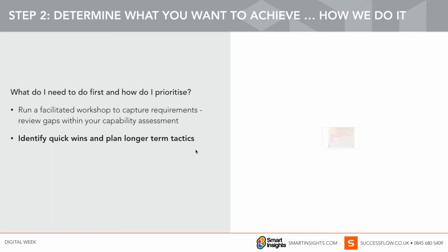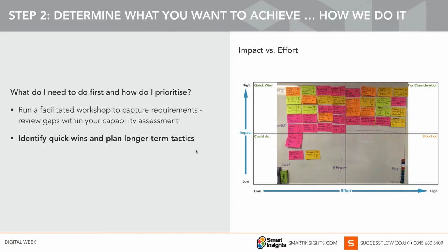One of the things that would come out of the facilitated workshop is this impact versus effort model. We love this. Our clients love this. In terms of high impact down to low impact, and low effort to high, your quick wins live here. We get straight onto these ones and show results and show deliverables. And then we've got some other ones here. So maybe good benefit in there, but then further consideration. That is something we would advise you to do.